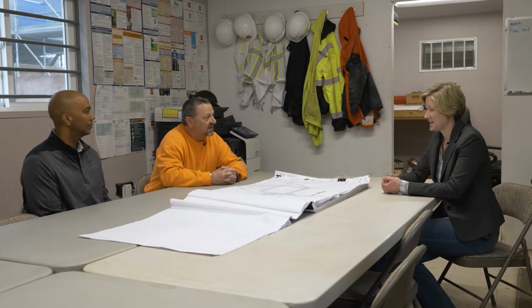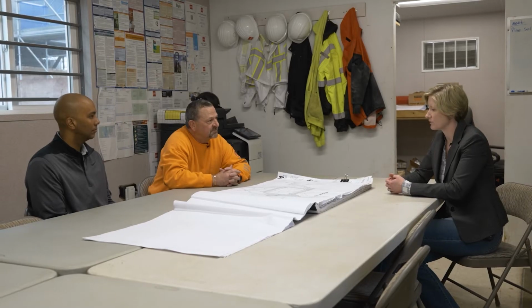Dock, just later on a spec building like this, actually I'm pouring both ends and not pouring my dock for a while just because they might get a tenant. And I told spec that I will hold off till the very last. And then if they don't have a tenant, then we'll go ahead and pour that. Okay. That way we don't have to cut it back out. Right. A little more efficient that way. Yeah. And that shouldn't hold up anything else on your building.